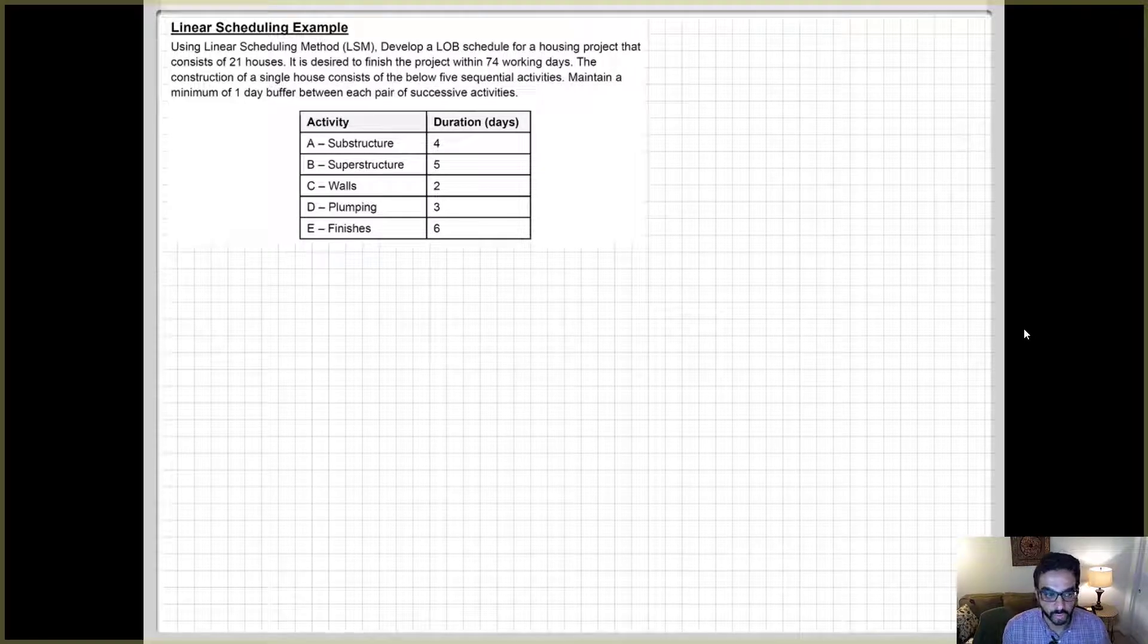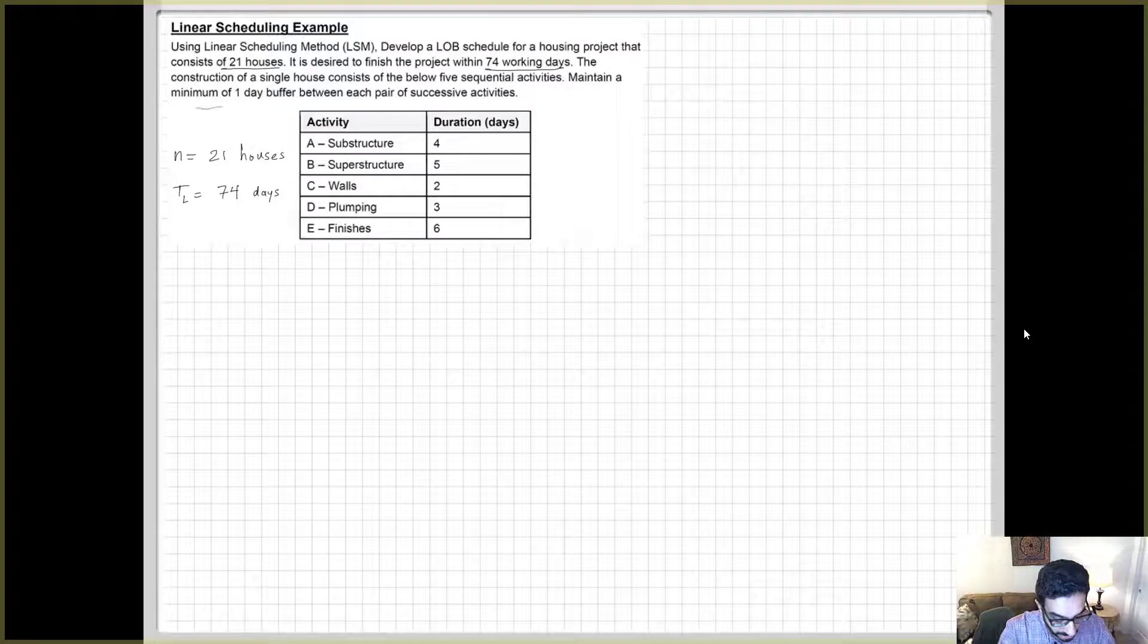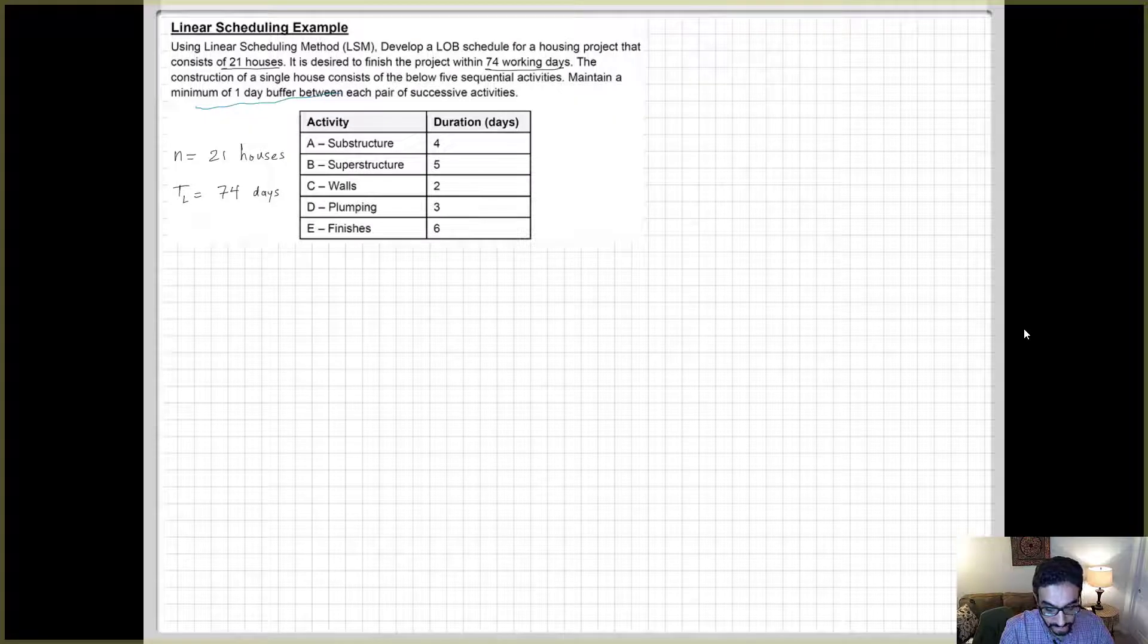Hello everyone. This video will go through an example of linear scheduling for projects. We have a housing project that consists of 21 houses, so our N, the number of units, is 21 houses, and we need to finish them by 74 working days. The table shows the repetitive five activities that we have in each unit or in each house, and there is a minimum of one day buffer between each of these activities. So total will be four buffers.